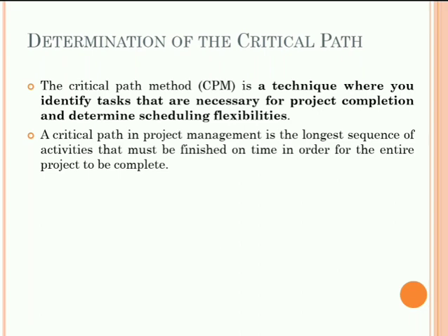The next step is looking at the end time of the last activities in the sequence to determine the duration of the entire sequence. Next, the sequence of activities with the longest duration is the critical path. Okay, using the same example and the same steps, we can calculate the critical path for each and every task, and we can understand how that particular critical path is calculated in any project management.